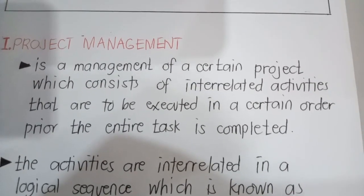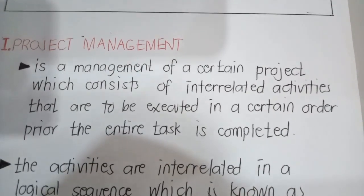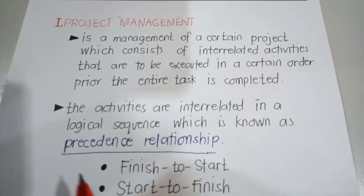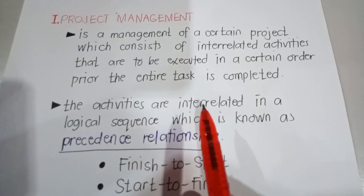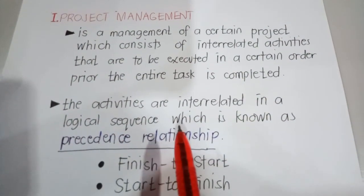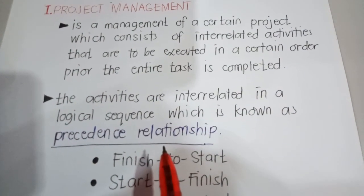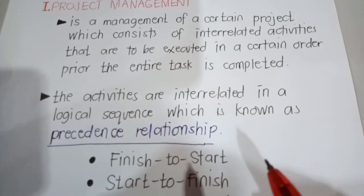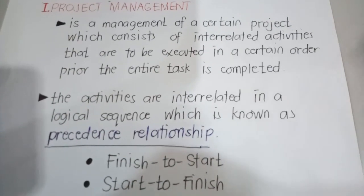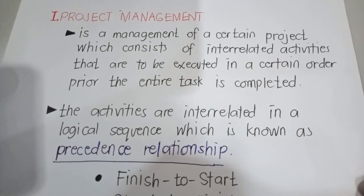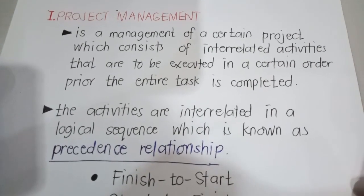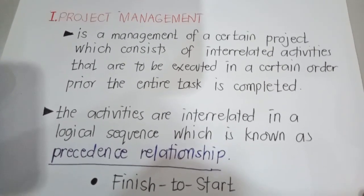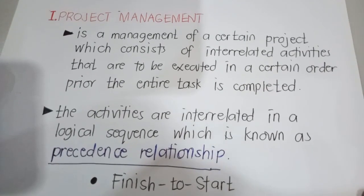So what is project management? It's not a tool or a person — instead, it's a practice. Project management can also refer to activities that are interrelated in a logical sequence, known as a precedence relationship. The most common precedence relationship is when one activity cannot start until another activity has finished. Part of the process of building a project schedule involves breaking down the work into smaller activities, or the work breakdown structure, and then sequencing the activities.